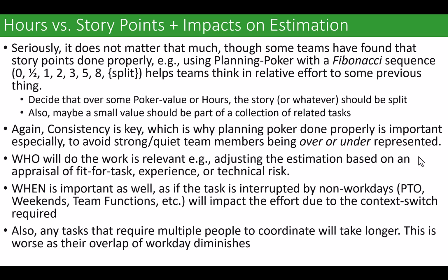So the advantage to story points, especially using the planning poker methodology where the values are a Fibonacci sequence, is that humans are much better at thinking about relative levels of effort. And the Fibonacci sequence forces us to make overs and unders that consistently have the same spread of over and under, even as the size increases. General rule of thumb is don't allow things to be estimated that are too big.